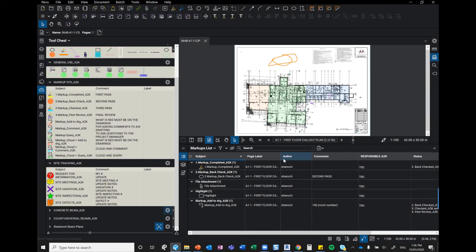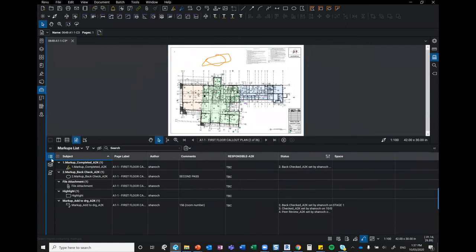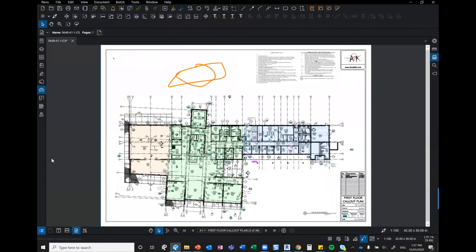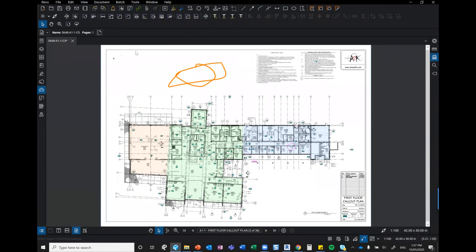You get a vanilla set of markup tools and custom columns, a vanilla PDF. And as soon as you put one markup on there, anything from that profile will actually go into the PDF itself. So you want to make sure that your PDF is showing all the right information before you take it up to a studio session. And the easiest way is just to get one markup. And for one client, we just made up a fake stamp. It just said issued to studio session, which basically meant that your custom columns and statuses have been embedded into this PDF, and they will work inside the studio session.